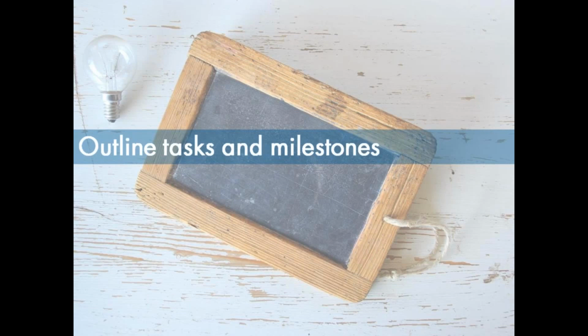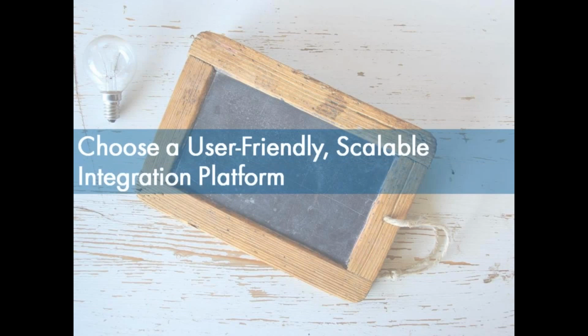Within this plan, you want to make sure that you outline all the tasks and, more importantly, all the milestones. So you've got something you can actually stick to. What I often find works for projects that I'm working on is to look at your completion date, your target completion date, so when you want to get everything finished, and then start working backwards. Most importantly, make sure every single stakeholder is aware of the overall milestones, as well as highlighting their individual milestones as well. Communication is obviously key.